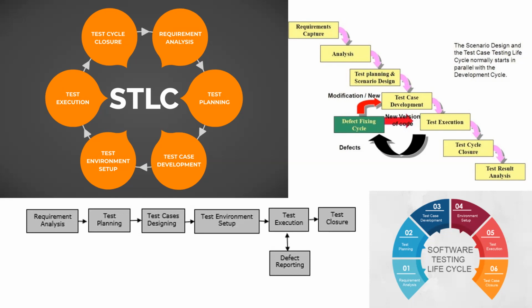Based on that requirement understanding is where our planning comes in. So we want to plan our testing. Plan in the sense of what kind of testing is required, and what the timeline looks like. What are the resources that we need to have to make sure that we finish our testing properly? And when are we going to begin, or when is the testing going to start? Or when and what kind of testing effort is required? So what different modalities of testing are needed for us to finish that, and when can we start, and when can we say we are done with the testing? All that needs to be planned, and has to be documented. So, test plan document.